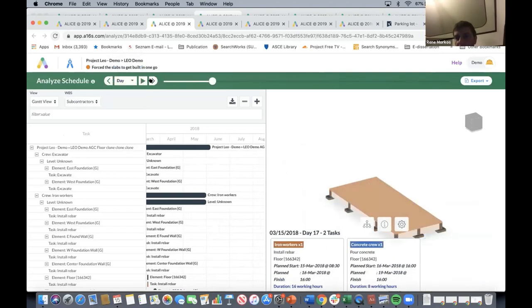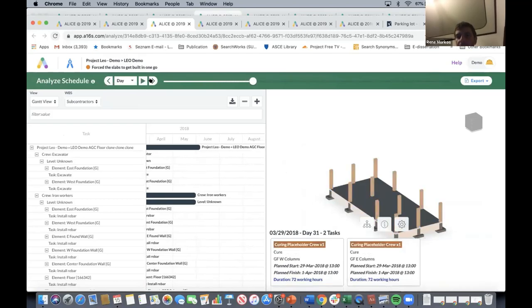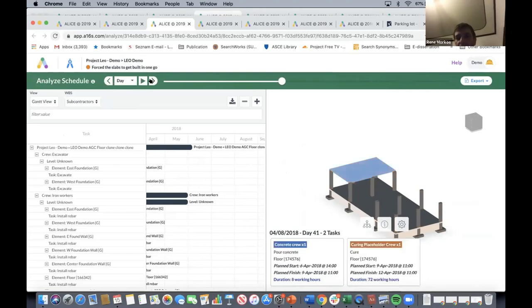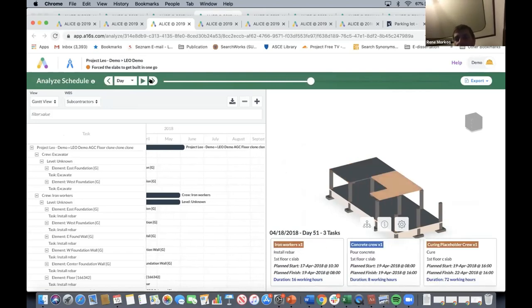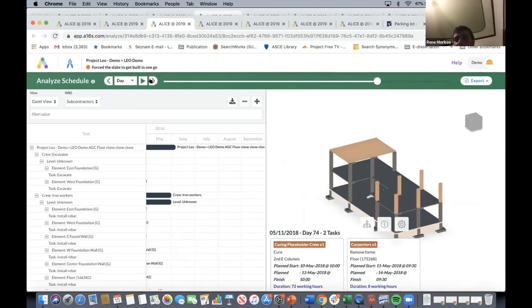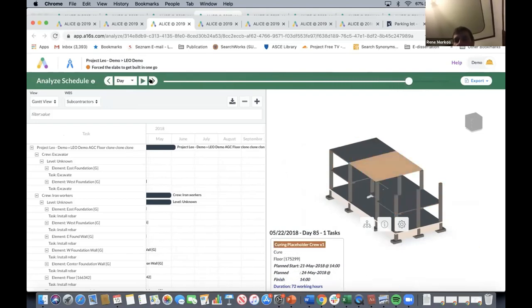So that's all gravy. And now you'll notice that I had to build and finish that whole thing, and then that and finish that whole thing, and then that and finish that whole thing, if that makes sense, right? Same with the roof. I got to do that and then that and then that. And that really, really slowed things down.